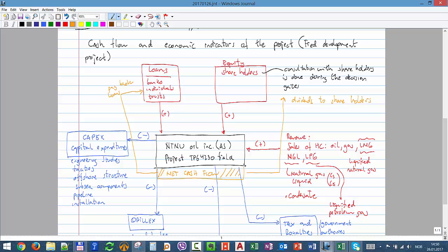What exploration cost is included? I didn't include exploration cost here. Usually we don't add the exploration cost when we go to the NPV calculation, and that's usually not included in our calculations. Remember, we are making some simplifications.